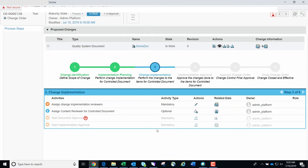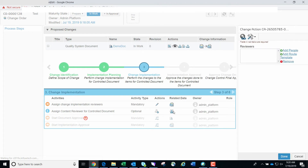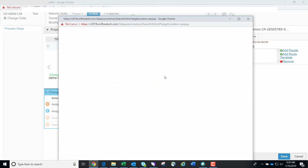We are now in step three of the process steps and will need to assign a change implementation reviewer to the change action. We click the pencil icon in the actions menu, which launches the change action for this CO. We will add a person to the change action and then click OK and then Done.